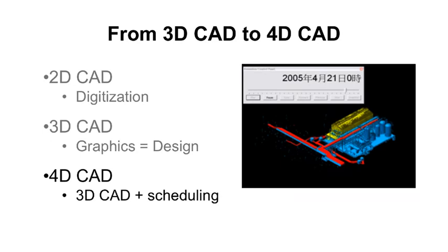In the 90s, some research efforts initiated from Stanford University started to promote 4D CAD applications. 4D CAD integrates 3D CAD model components with their corresponding time or schedule related information in an AEC project to simulate the construction process. It helps to facilitate team coordination, reduce design and construction conflicts, and support better decision-making with information visualization, both before the actual construction work starts and during the construction.